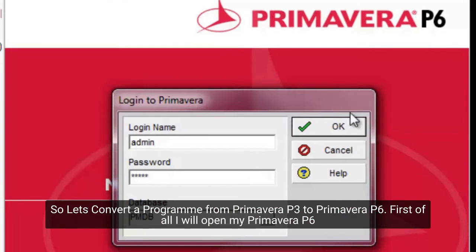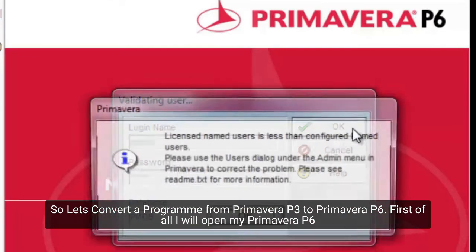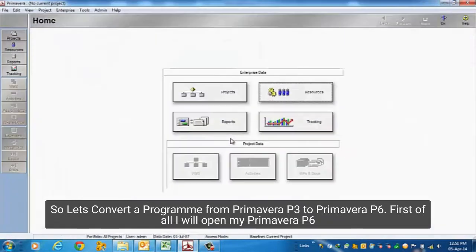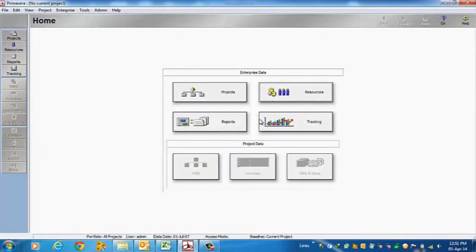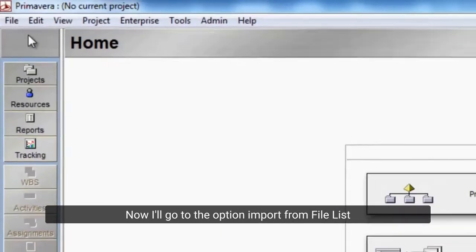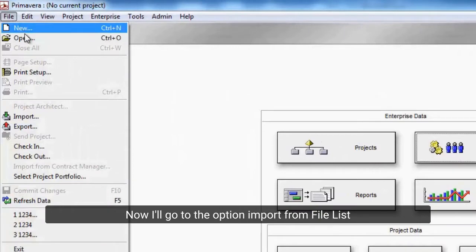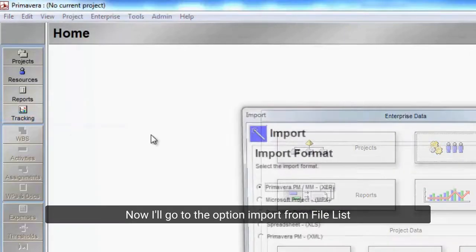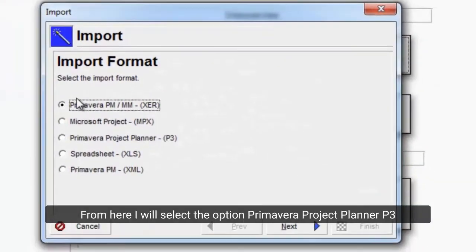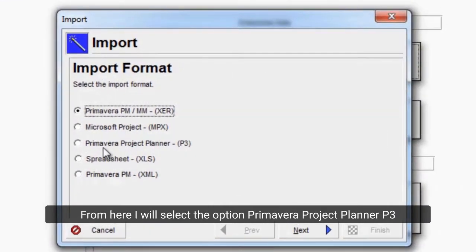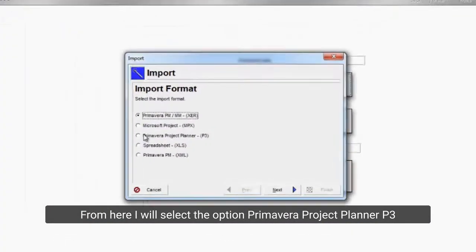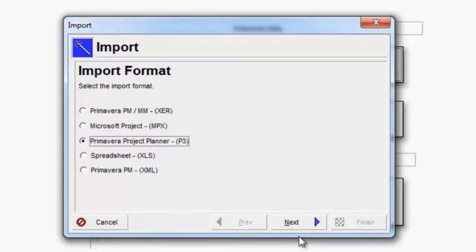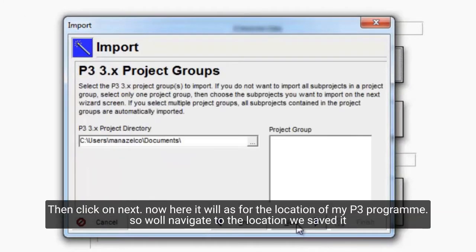Let's convert a program from Primavera P3 to Primavera P6. First of all I will open my Primavera P6. Now I'll go to the option import from file list. From here I will select the option Primavera Project Planner P3. Then click on next.